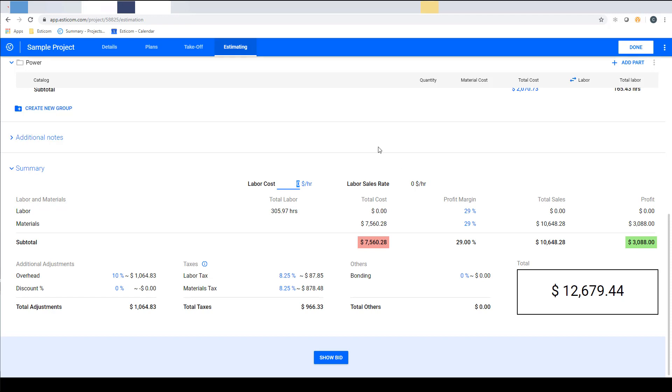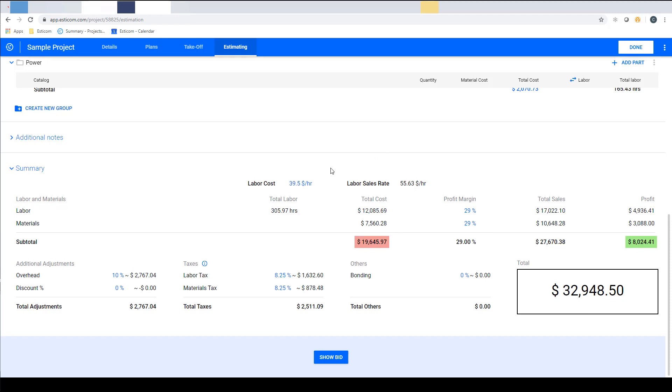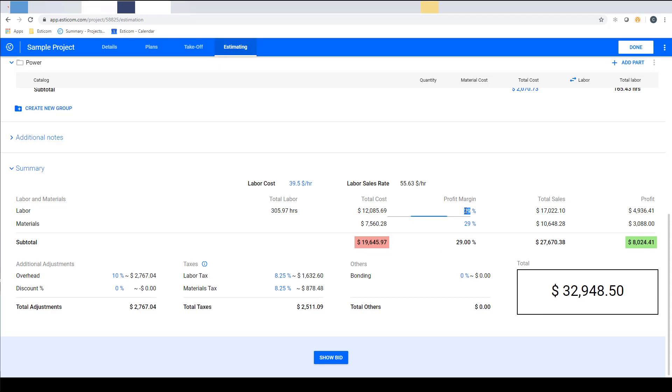Here you can add your company's fully burdened composite crew rate which is an hourly cost or average for a typical work crew. This rate is then multiplied by the number of labor hours to get your total labor cost. Below that you can see the total material cost and in red the total project direct cost.